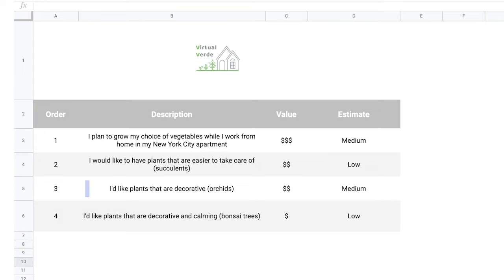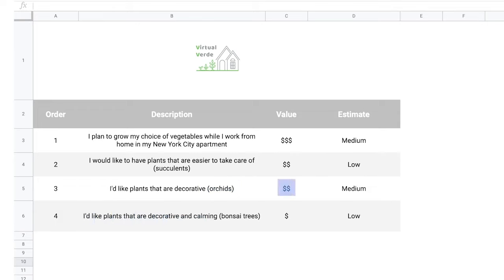Their product backlog lists: one, succulents; two, orchids. But if support receives an email from a user requesting bonsai trees — which are also hard to care for — where do we put them? The product owner does research and decides to prioritize orchids first because many more users requested orchids versus bonsai trees. Orchids receive a two-dollar-sign value rating, bonsai trees a one-dollar-sign value rating, and bonsai trees go last. When creating backlog items, include as much as you can without stressing about unknowns. Document assumptions and move on — you can study details more when the item becomes higher priority.